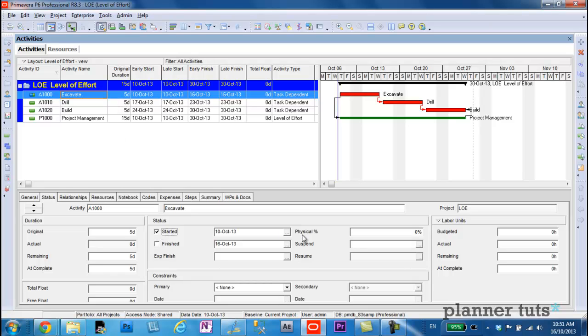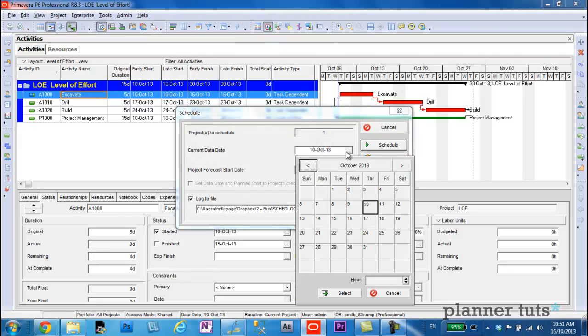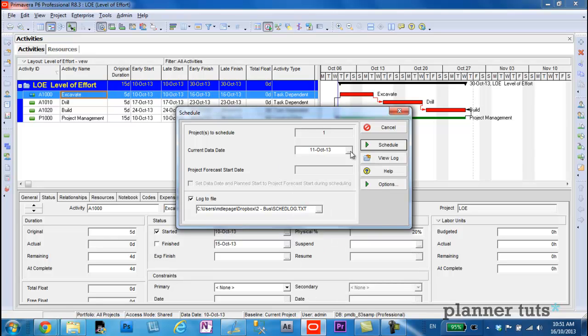I'll mark this activity as started. Let's say we've accomplished 20 percent of our work, and there's four days remaining. So essentially, one day has passed. I have simply moved my day-to-date ahead one day and rescheduled the project.